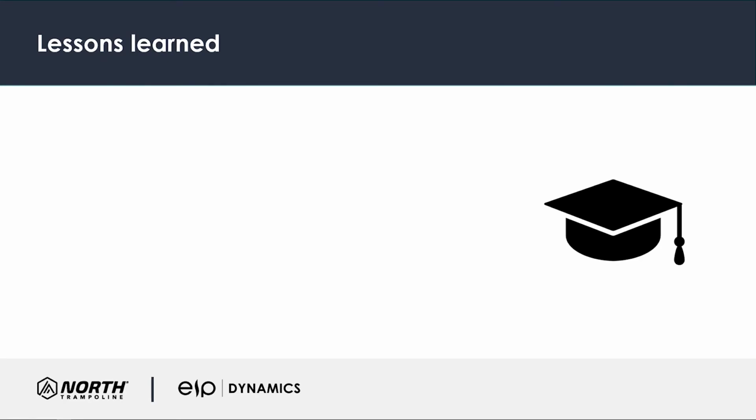We also have some lessons learned around the topics where we had particular challenges, or maybe things that could have been done differently. What about the short timeline, Patrick? From your perspective, what consequences did this short timeline have? Except for putting, let's say, tremendous pressure on the organization, because a lot of people working in the project also had their operational day-to-day activities to take care of. So it took really careful planning. We really needed to plan a few weeks ahead, making sure that people were available, and putting the project time when it was the most convenient.